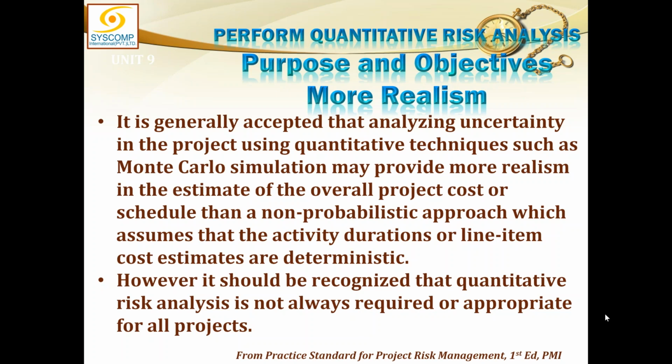I can say, okay, if this activity has delayed from 3.83 and it has taken 4 days, then probably we are already in our first deviation, and our first deviation can drag us as far as 5.33 days. So we will try to do the damage control and not let it go beyond 5.33 and contain the risk within one deviation. Although the second deviation is more risky, even if I enter into the second deviation, it still can probably be controlled. Although some money will be lost, some time will be lost, we will have damage. It is not free of cost, but still it is doable. It can be contained. But anything beyond the third deviation is impossible.